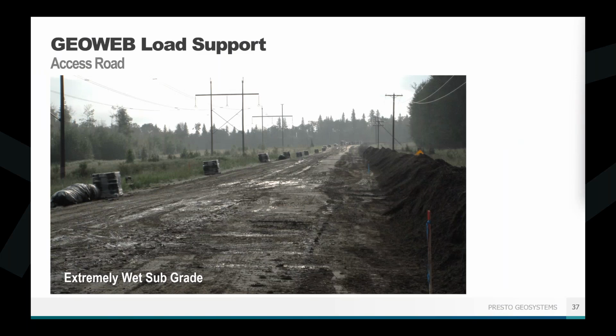We collaborated with contractors on that material staging, and it was further complicated by fiber optic lines running down one side of the road, which restricted the contractor's access to that area. And so we worked with our distributor and the project owner to provide that recommendation that ensured a stable road surface and it could be installed within the 2-week time frame. So even in challenging projects, we are going to work with you, work with your contractors, work with your project owners.